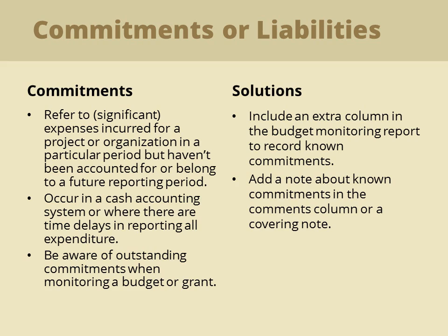If significant commitments are not taken into account when compiling budget monitoring reports, the results may under or overcount the true level of expenditure and give a distorted view when compared to the budget.